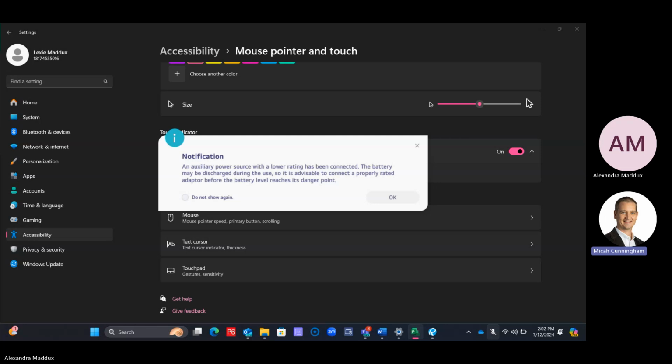You can also add the layout and grade pad to follow building pad. So scroll up to building pad under earthwork. This is where it's helpful to use your control key, because then they're not next to each other. Click on building pad, then scroll down and, using your control key, click on layout and grade pad, and then link those together.